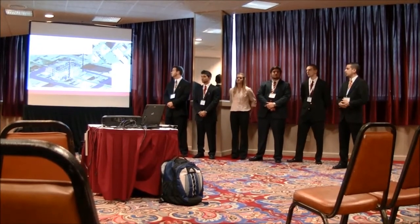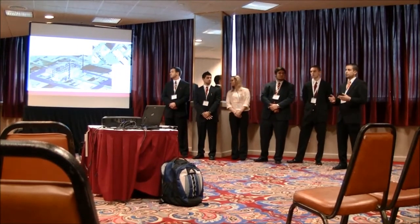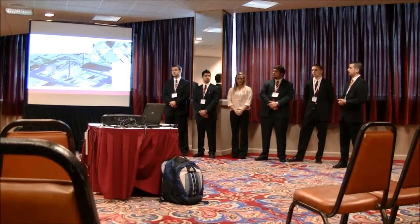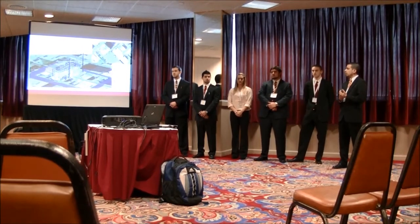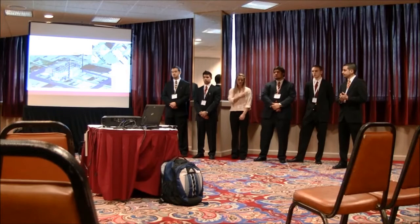As Kyle mentioned, we decided to break up the building into 2 separate zones, and as a result, we felt that 2 cranes maximized our schedule as well. Our cranes were sized based off of our maximum pick, which was found to be about 110 feet away from our crane and needing about a 2.7 ton capacity.